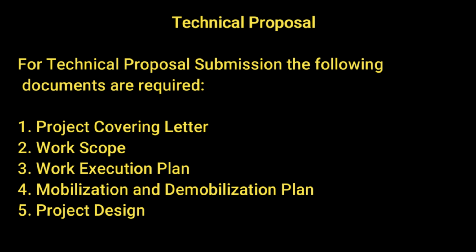A mobilization plan is required when the contractor will shift equipment, manpower and other resources to the work site. Also, a demobilization plan is required after completion of work when the contractor will remove all his equipment, manpower and other extra resources from the working site. Next is project design. Contractor has to submit a detailed project design for the relevant project.